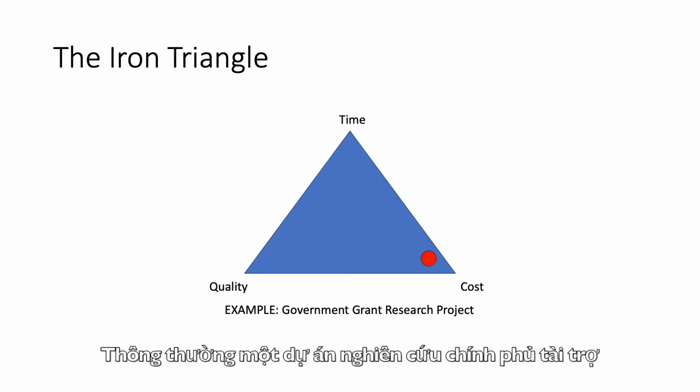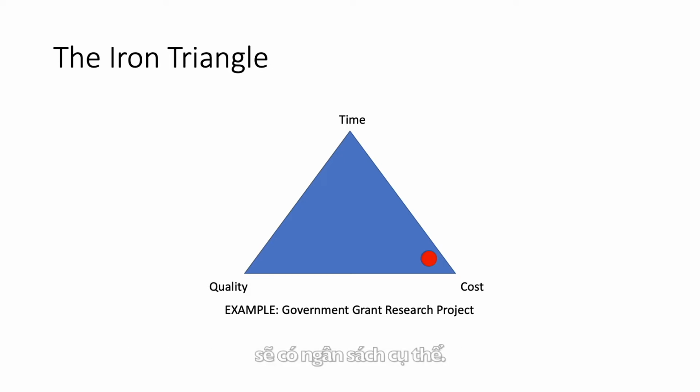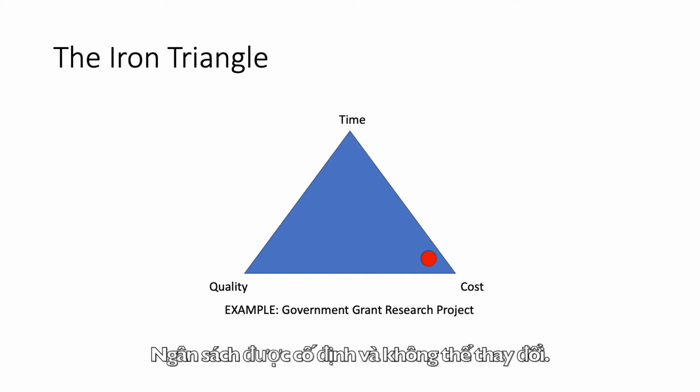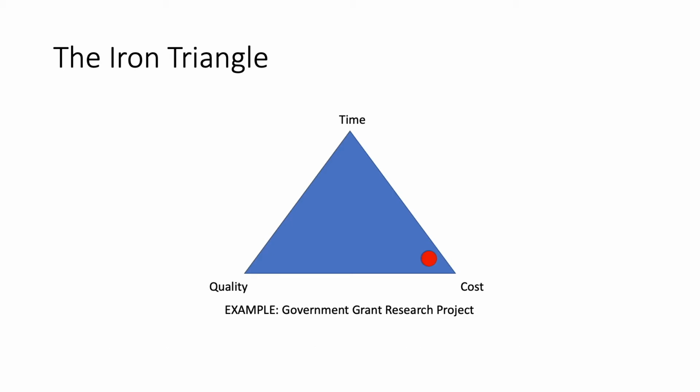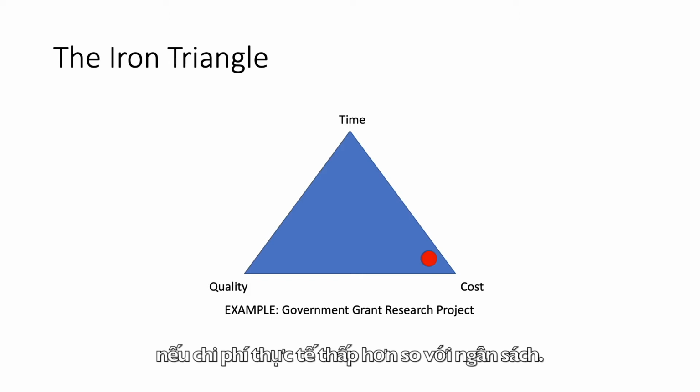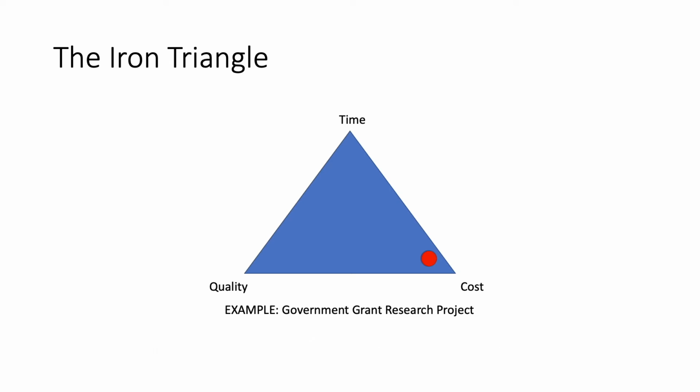Normally, a government-funded research project has a very specific budget. The budget is fixed, it cannot be changed, and to manage the project in a way that exceeds the project budget is completely unacceptable. And furthermore, it's usually equally problematic to manage the project such that the cost of the project comes in well below the budget.